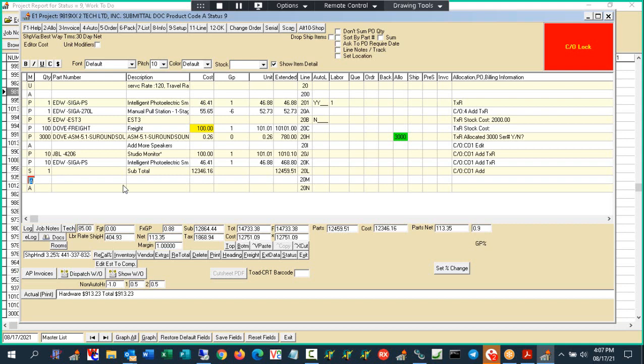We don't even have the parts in our hand. 99% of the time, there's negatives, and we don't even know why or where they're at. And then they're going into our inventory on top of the job, cost being down. When you do partial billing, it's allocating it back to inventory. Correct. Now, because it's there, inventory's inflated, and it's not really here.